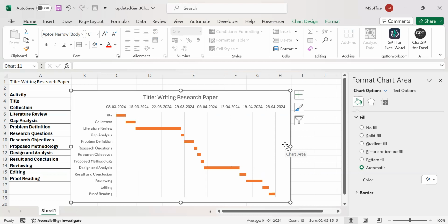Okay, so you can try with different types of projects, assuming different types of projects, breaking them down into the activities, assuming the start date, the duration, the end date, and the extended duration. Okay, you can exclude the weekends by selecting the formula WORKDAY for the end date. So this is how you can do it.